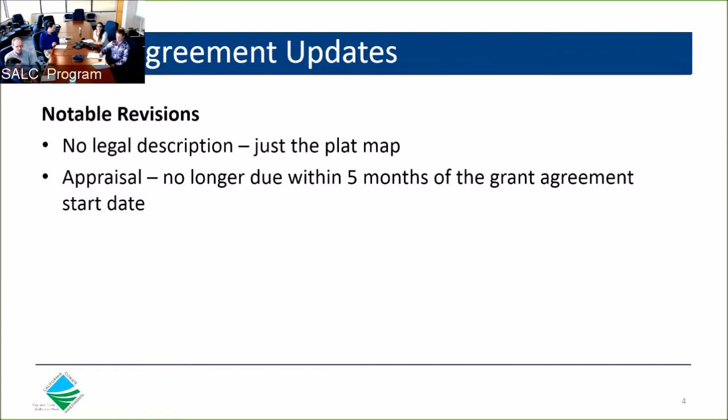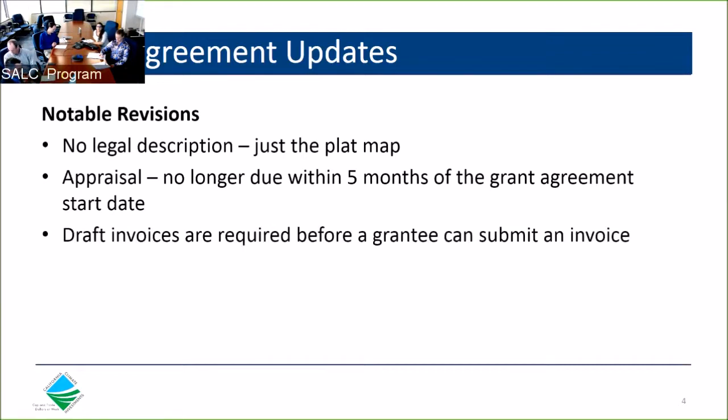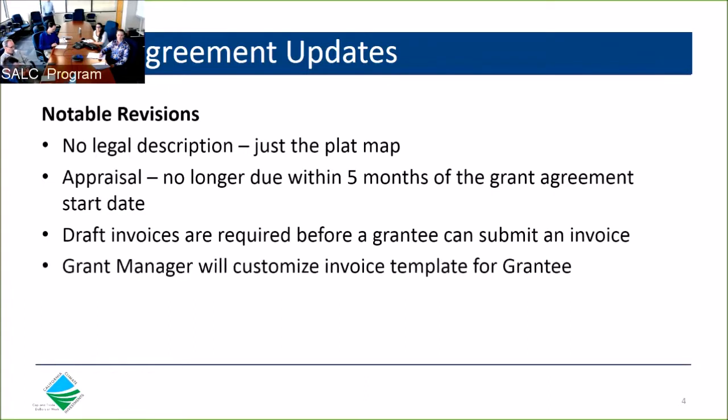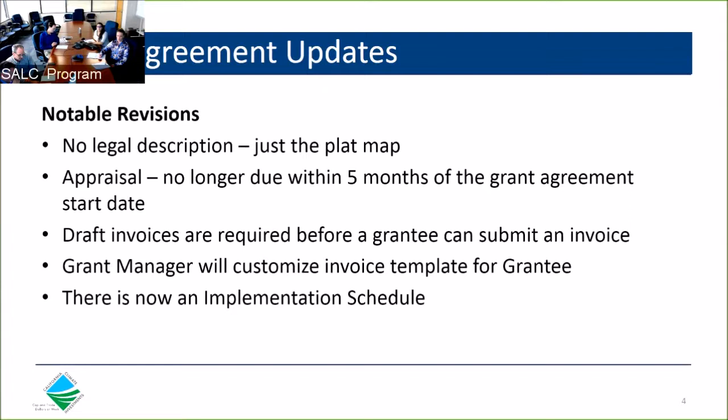The practice of requesting draft invoices for the grant manager's review prior to formally signing and submittal has now been included as a requirement. This provides the grant manager and grantee with an opportunity to identify and resolve any issues before receiving the formal invoice. Grant managers will also prepare a customized invoice template that will be provided to the grantee for use. And the implementation schedule has been reformatted and fleshed out to include greater detail.